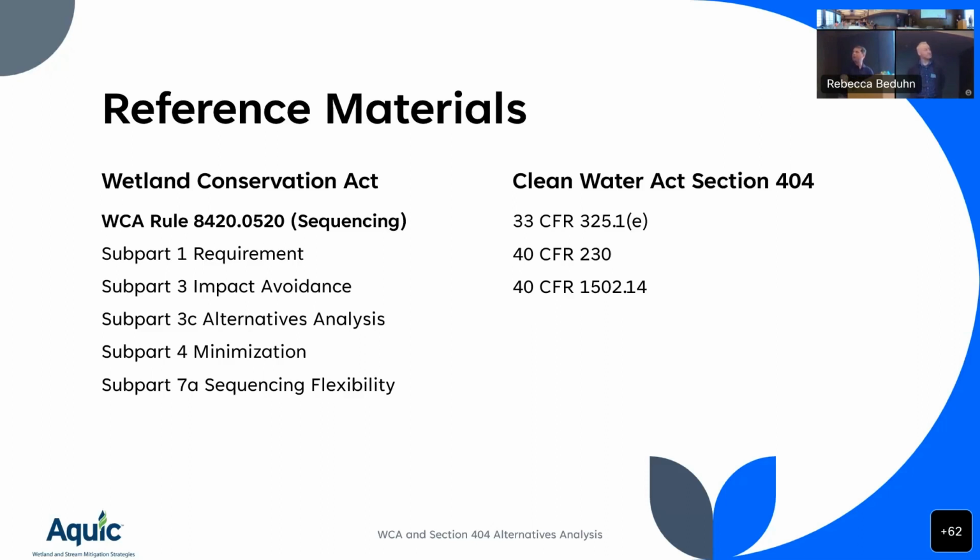And then the last reference down there, 1502.14, anybody know what that is? No, that's NEPA. In 33 CFR 325 in the Corps regs, there's an Appendix B, which is how the Corps does EAs and NEPA documentation for the permit process. And that references the NEPA regs, where you can find more information on doing a NEPA alternatives analysis. But to be clear, a NEPA alternatives analysis may not satisfy a 404(b)(1) determination. So they're not the same. They could end up being the same, but they're not always the same.